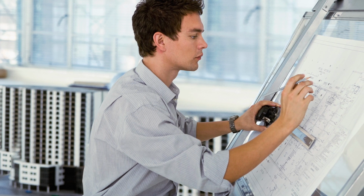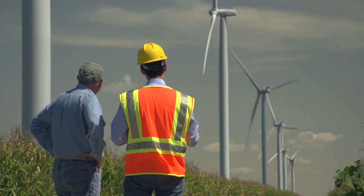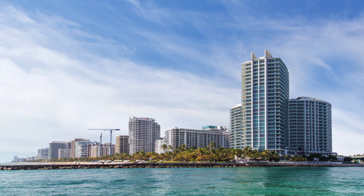Value engineering is a process that has been developed to give you best value for a project or a product or a process. Essentially, it focuses on the concept of function. So rather than thinking about what things are, we look at what things do. So instead of looking at the problem as it's presented, which may be an existing building or an existing product, you redefine the problem in terms of functions, an active verb and a measurable noun.